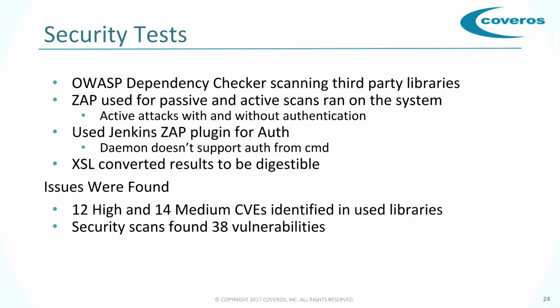And what we did was we basically adjudicated all of these and decided whether or not we needed to address fixing them. We added these to the backlog as opposed to immediately fixing most of these, and reprioritized them. Unfortunately, due to the way the project was set up, most of these security things were deprioritized by the management team, the people we were actually building the project for. So we did not spend a lot of time on fixing some of the issues. Some of them we did, especially if they were relatively simple. And that actually did become an issue, and I'll talk about that when we get to some of our later tests.